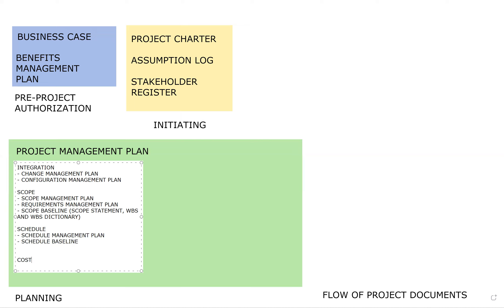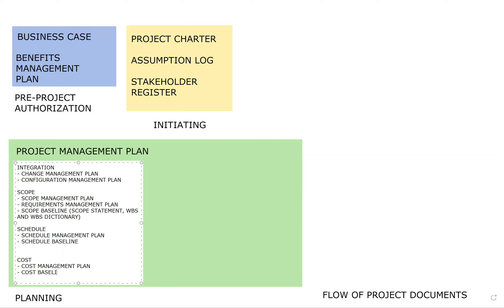Next we have cost. Again, we have a cost management plan and then we have a cost baseline. The cost baseline is your snapshot of the approved budget — it contains all of the projected costs, the estimates for the tasks, and the contingency amounts. It does not contain management reserves, though. So you've got to keep that in mind.